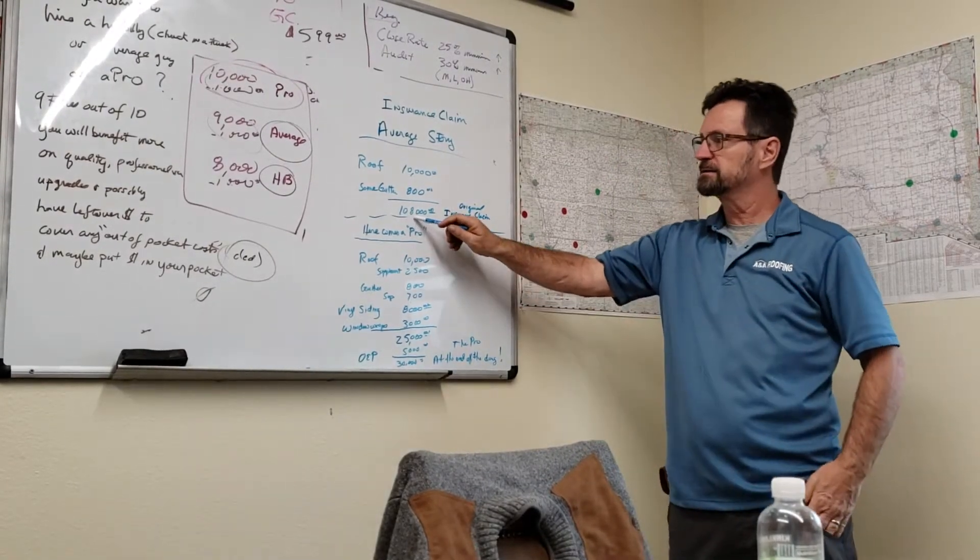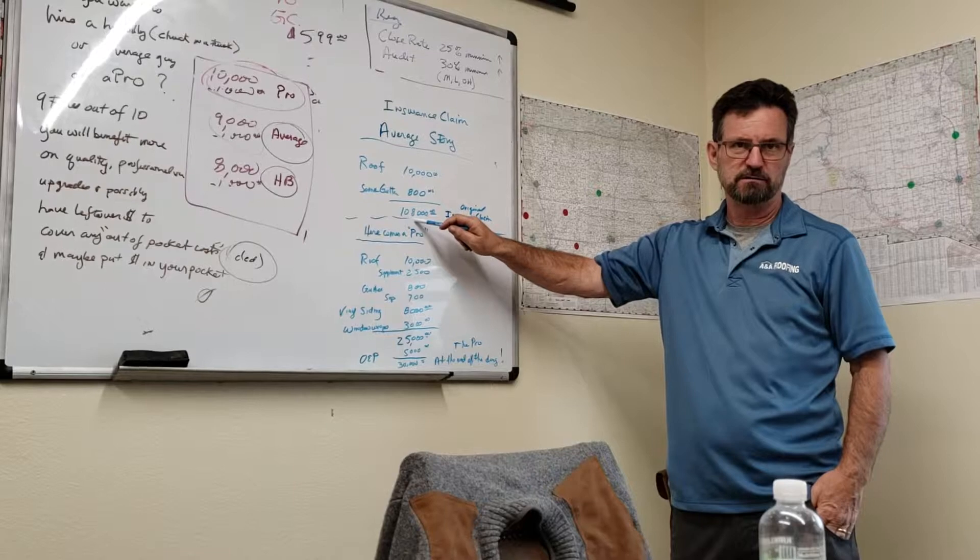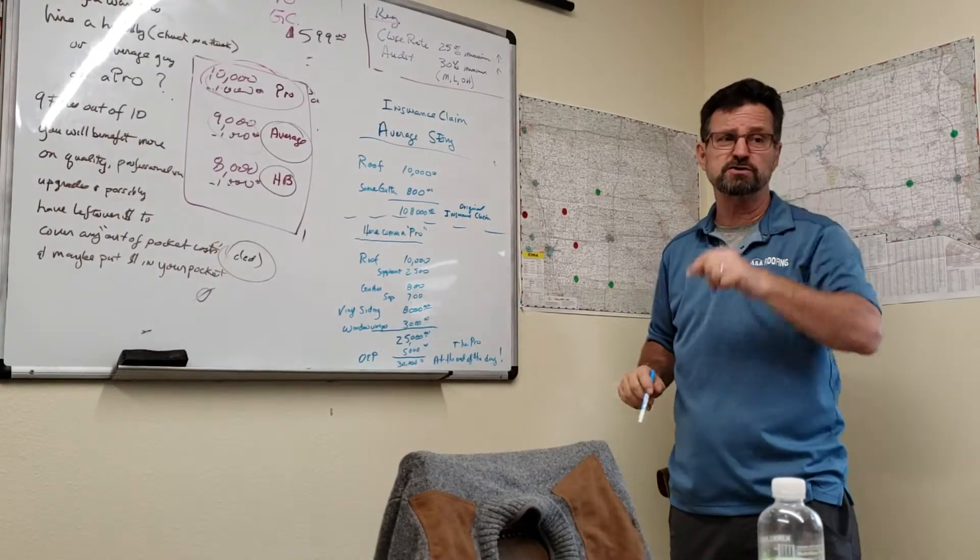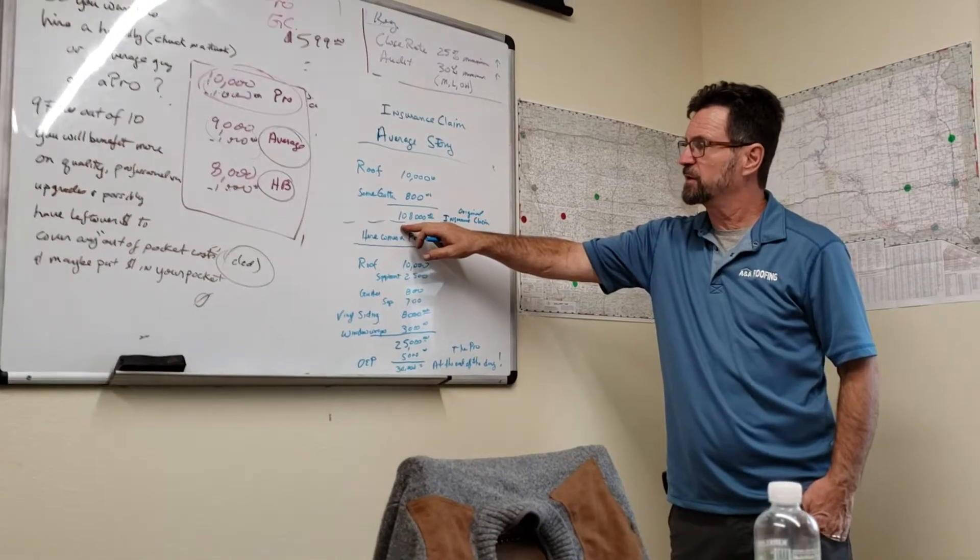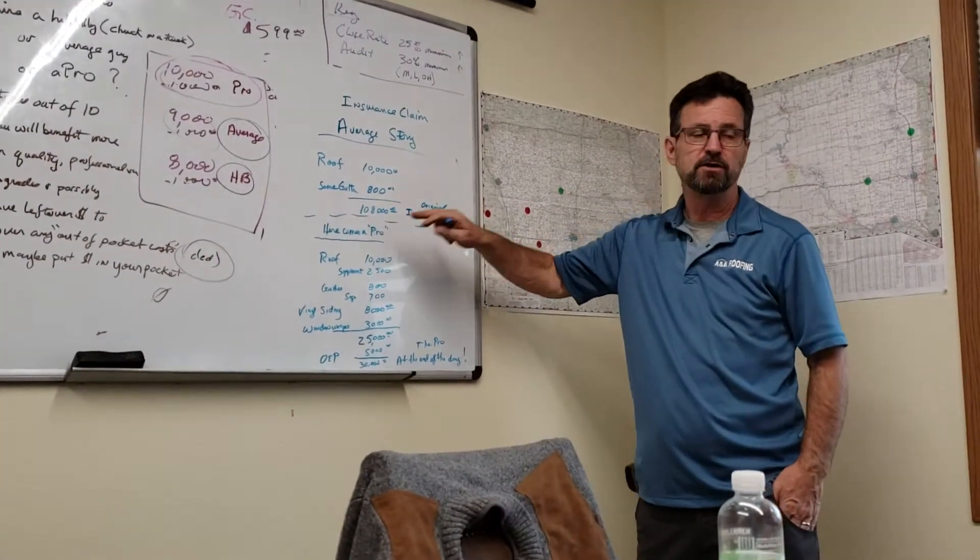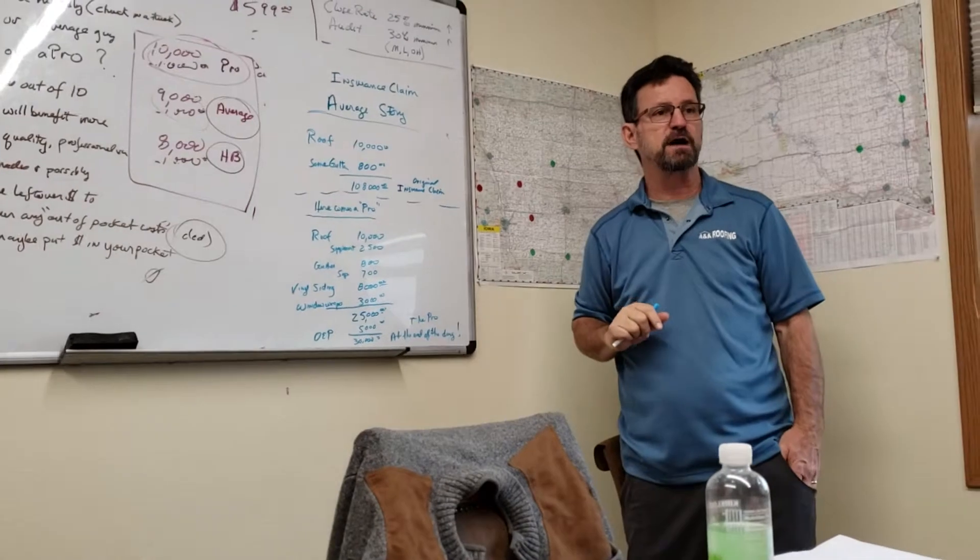So you're going to get all this less your deductible. Your deductible, you have to pay your contractor. And if it's $1,000, then that means the insurance company is only going to pay $9,800 of it. You have to pay the extra $1,000 to your contractor.